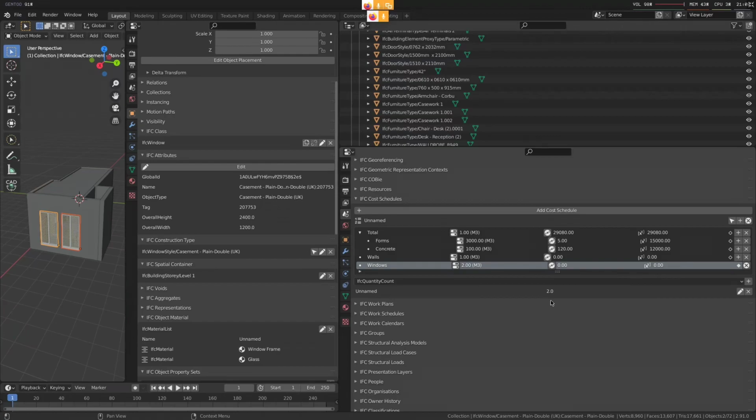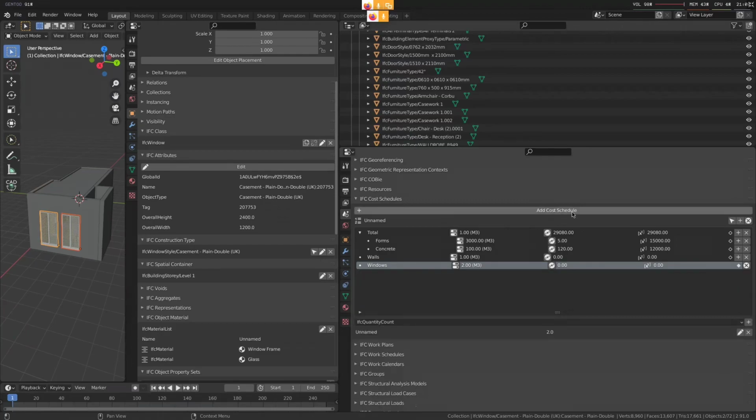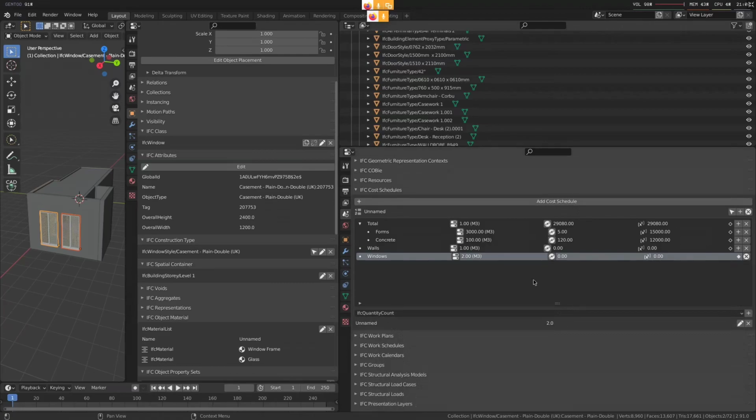Yes, that's relevant because we need to know both the total quantity, or the split up quantity eventually, speaking as a coster, split up quantity by level, by building, by total. I think this is giving me the total, and then I need to assign a cost to a type from time to time. I think it's also a very good feature to assign individually because this can happen.